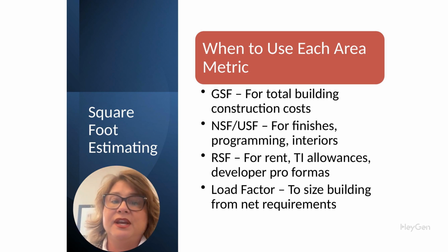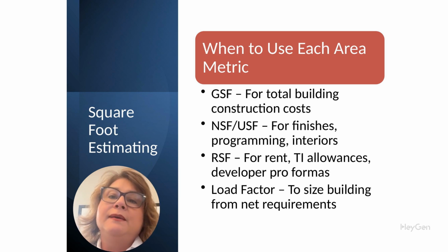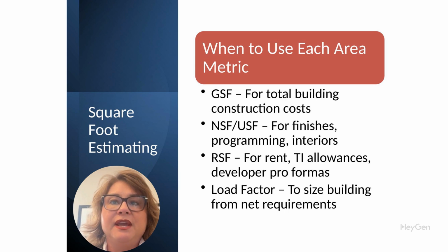1. GSF, gross square feet. Use gross square feet, GSF, for estimating total building construction costs. This includes everything inside the exterior walls, whether it's usable or not. So if you're doing conceptual estimates, structural work, or pricing by system, HVAC, MEP, exterior envelope, always estimate using GSF.